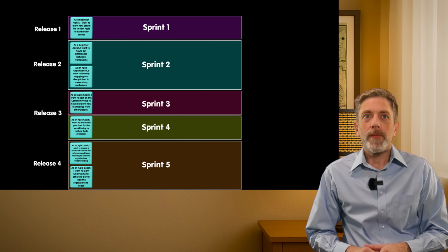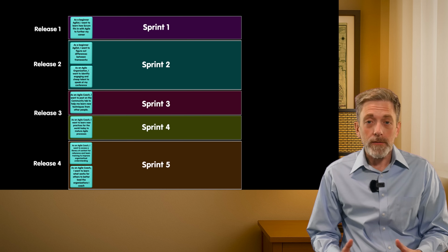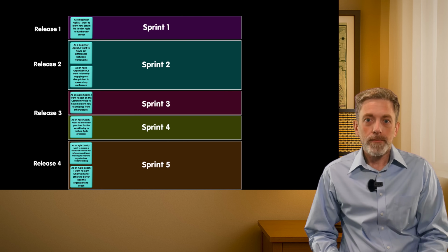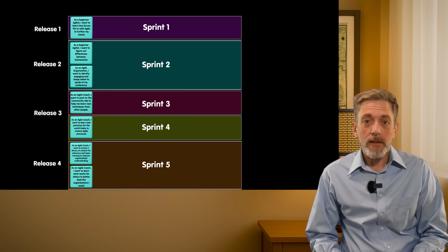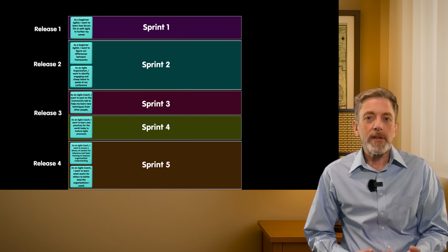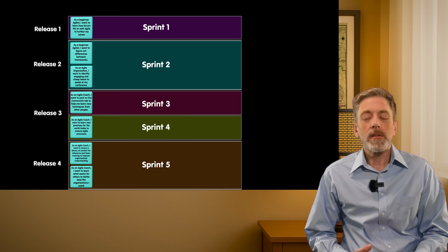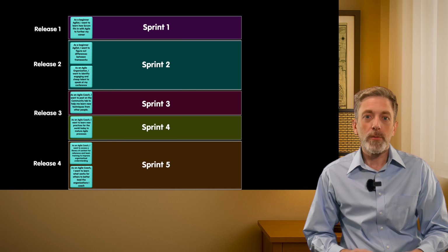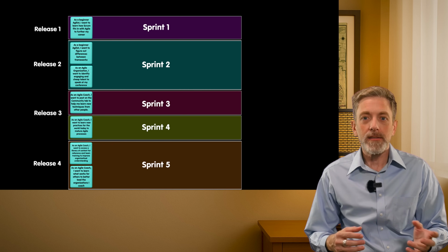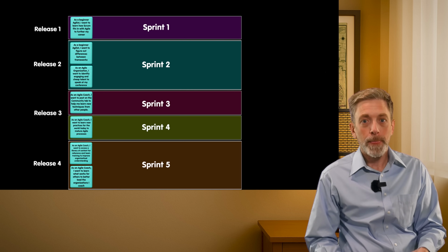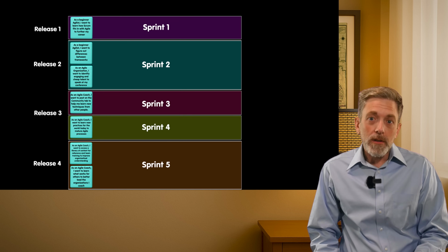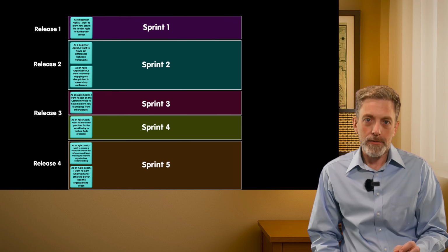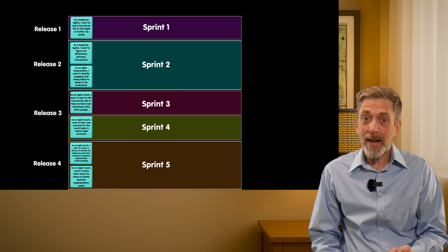So you can create your definition of done as you see fit that makes sense for your product and your goals. In software development, using continuous integration and continuous delivery models, each user story might be released as it's completed, removing the release as a separate thing altogether. For that to work, each user story must truly be independent of all others, which is harder to do in practice than you might think.